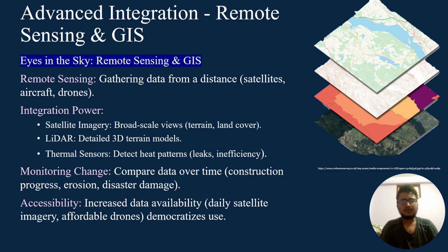What makes this integration particularly valuable is the ability to monitor changes over time. By comparing remote sensing data captured at different time scales or different dates, engineers can track construction progress, identify unauthorized development, monitor erosion, or assess damage after natural disasters.